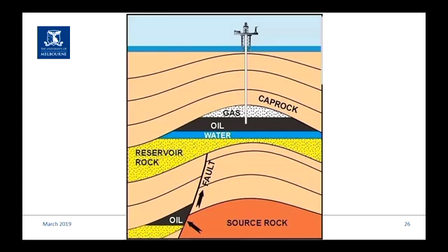So then, if you've said, think about the forecast. The forecasts say, all right, we think there's 100 million barrels of oil down there that we can extract. We think we can extract 10 million barrels a year. So that's saying that it's a 10-year reserve life. 10 million barrels a year for 10 years is the 100 million barrels. So you've put in your plan, it's a 10-year reserve life.